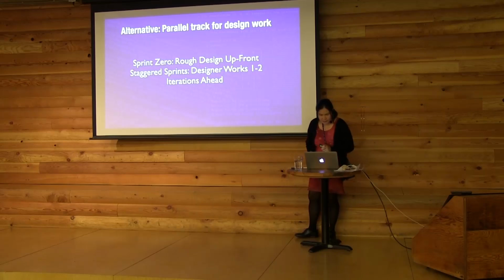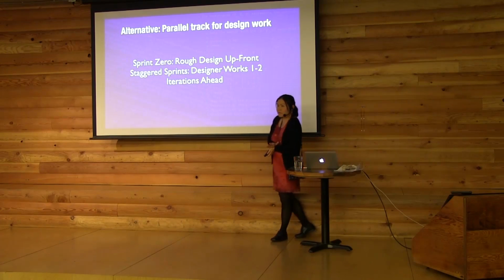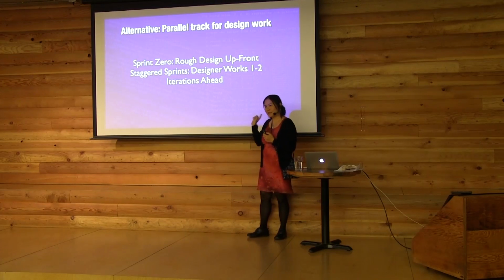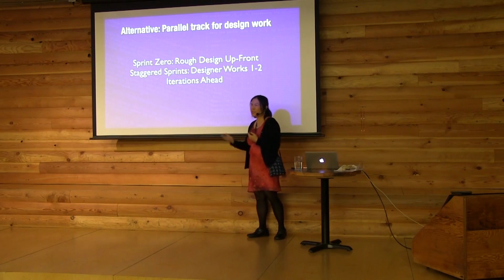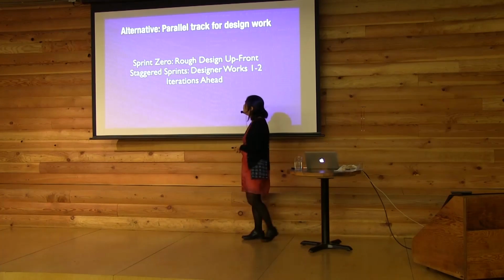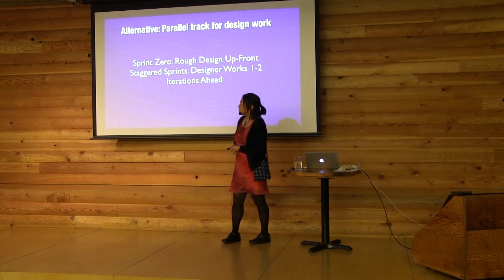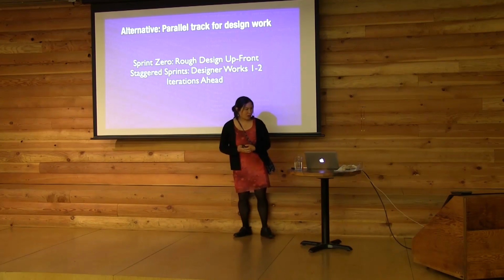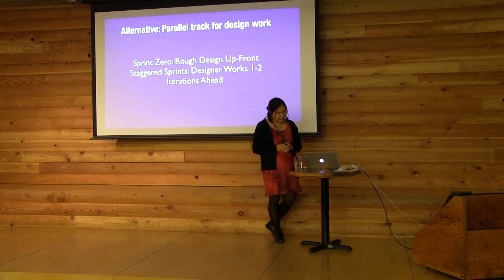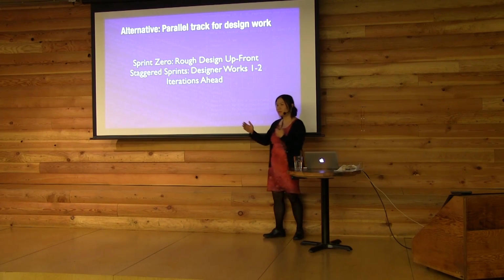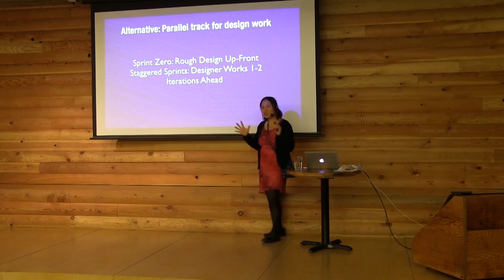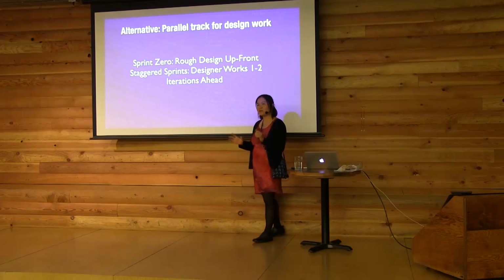So what's the alternative? This is actually a really widely accepted best practice. This isn't just an idea, it's a pretty well-proven idea. And the idea is you have the designer work ahead, often along with your business analyst. You give them a good lead time of 3-6 weeks or something like that. Not a huge amount, no one's advocating designing everything up front, but give them 1 or 2 sprints of lead time.